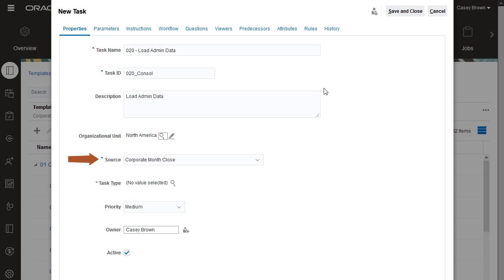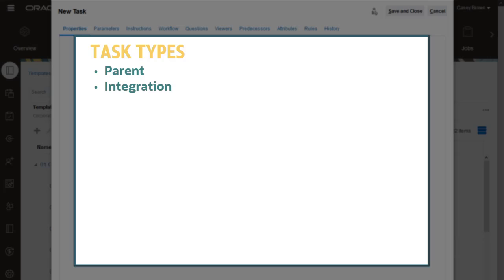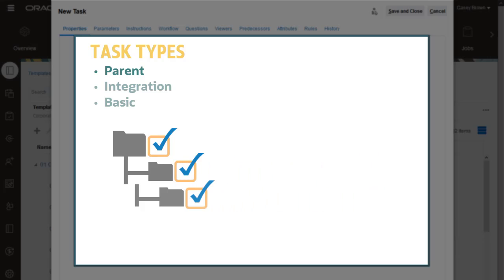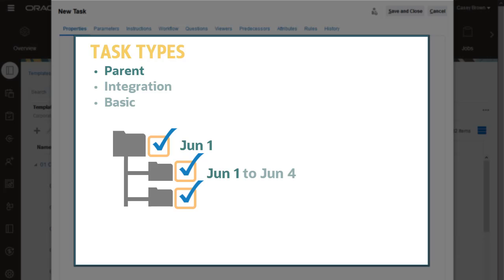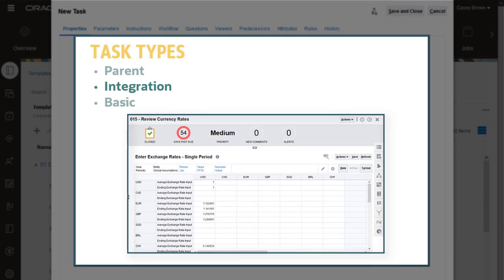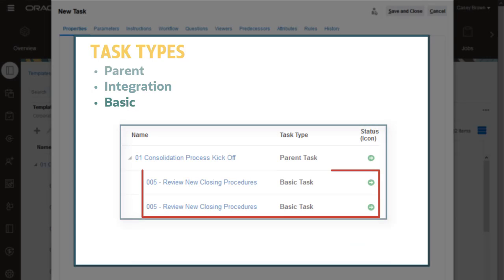You use this option only if you have other templates embedded in the current template. You can create parent tasks, integration tasks, and basic tasks. Parent tasks are useful for grouping tasks and schedules. Parent tasks have child tasks. The start date of the parent task is the start date of the first child task, and the end date is the end date of its last child task. Integration tasks include the application component you need to perform the task, for example, a data form embedded in the task dialog box. Basic tasks are tasks that do not have children and do not have an integration.